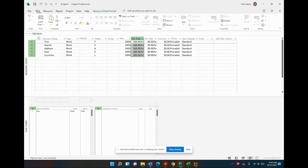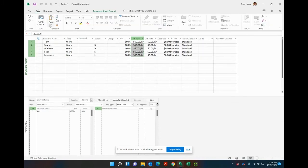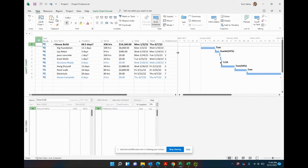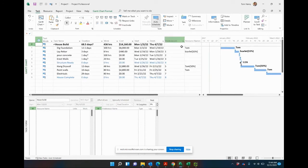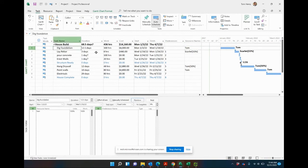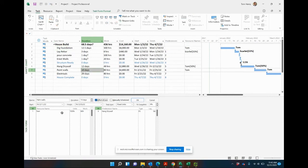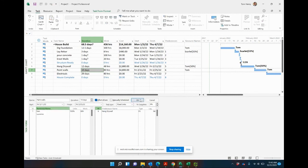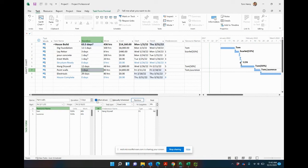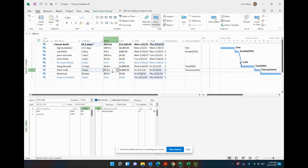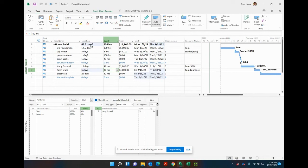Not only that, as you add additional resources, we go back to the Gantt chart view, you will see that the work can be split appropriately. So if I have 100 hours, let's take another example here, 10 days, 80 hours. If I make this an effort-driven task and assign a second resource, the work will be split across both resources. Effort-driven essentially locks the work for that task. Says you know this task is 80 hours, I don't care how many people you throw at it, it's going to be 80 hours of actual work. The duration can vary, but it's an effort-driven task. There we go. So because I had that first calculation of effort, I locked it. As I add and take away resources, it's going to really really help me to keep that number of hours consistent.